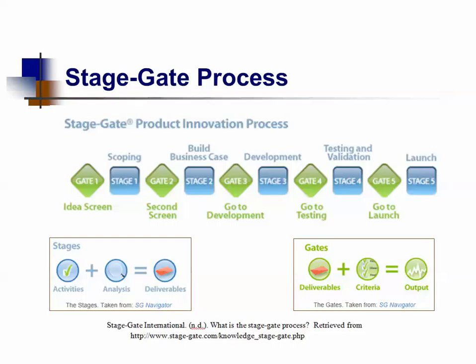In the typical Stage-Gate model, there are five stages. The first is pre-work designed to discover and uncover business opportunities and generate new ideas — this is the idea screen. The next is scoping, which is stage one, and it's a quick preliminary investigation and analysis of the project, essentially inexpensive desk research.